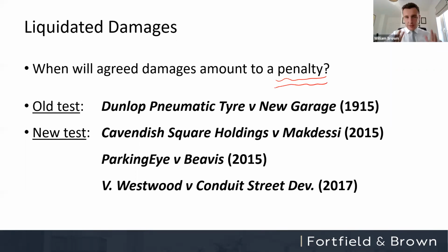So the point is this: under the law of England and Wales, it's the same in Ireland, it's the same in Scotland, the same in Northern Ireland, civil law does not enforce penalty clauses, okay? The purpose of civil law is not to penalize people. That's what the criminal system is for.